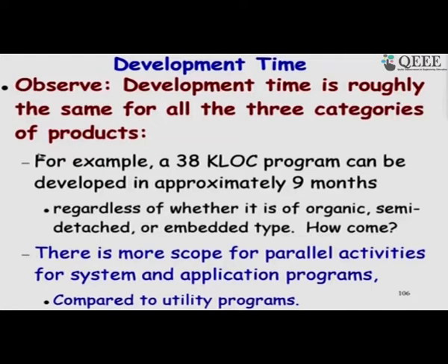We should use function point during the requirement specification stage, and as we proceed the estimations will become more accurate, and after the design and code writing stage we can get more accurate estimation, and there you can use lines of code. We will look at that. We have not discussed COCOMO 2, just going to discuss shortly, but the question of function point and line of code